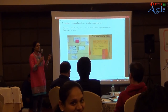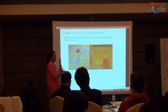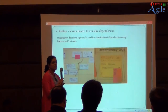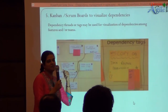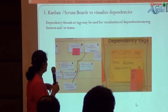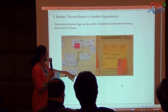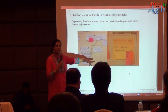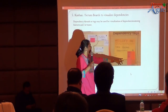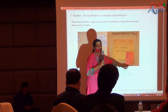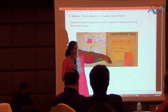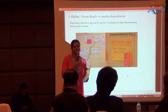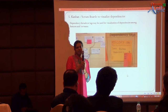The fifth suggestion is visualizing your dependencies. You can use your Scrum or Kanban boards to visualize dependencies — draw a thread joining stories to show dependency, or put a small tag to indicate an external dependency with another story.